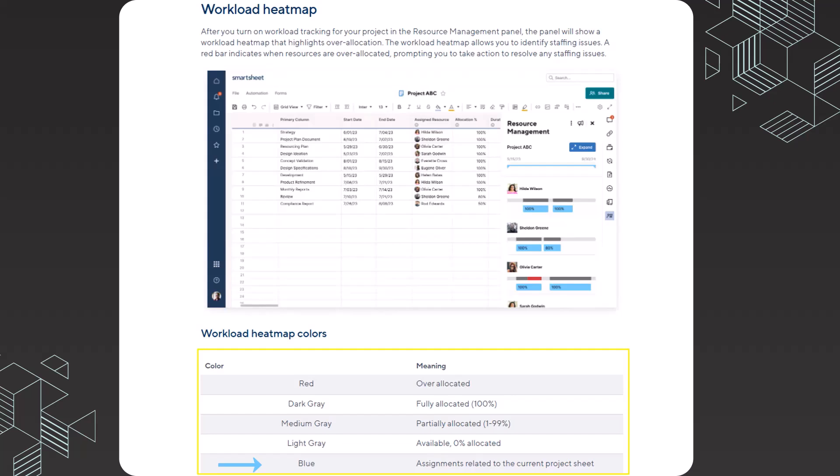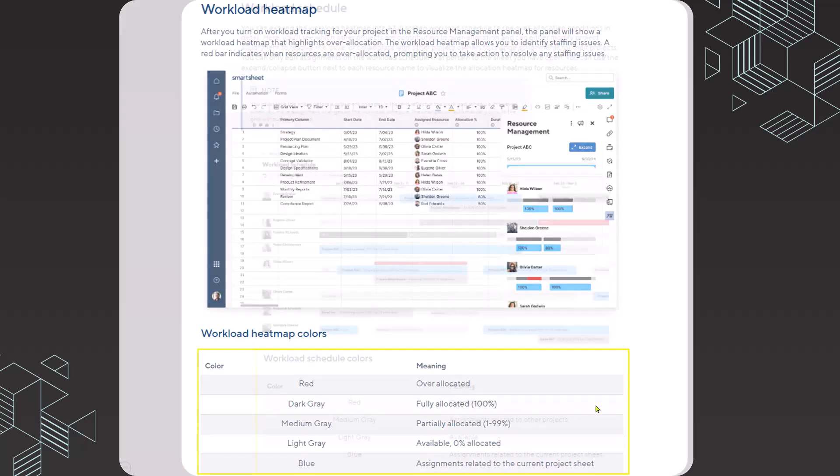Blue means that you're looking at the assignments related to the current project sheet. That is important because the current project sheet that you're working within, for example, this is project ABC, is going to be the only project plan that you can modify the resource assignments to. In other words, you can reassign some of the tasks within project ABC based on what you're seeing in the workload heat map or the workload schedule. And then if you need to make further adjustments to assignments within other project plans, you'll need to exit out of this project plan and go into the other project plan to make the modifications.